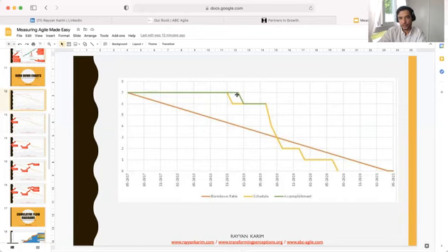And then we've got the yellow line, which is the schedule, meaning when they were in sprint planning, this team decided that based on the way that they're going to work, this is how their sprint will actually look on the yellow line. And then what they're doing every day is they come in, standing up around it, and they're saying, what did we actually get done? And they're moving their line accordingly. As you can see, they were a little bit later than they hoped, later in the day than they hoped anyway, for this particular point in time. But how do you read this chart and how can you adapt it?